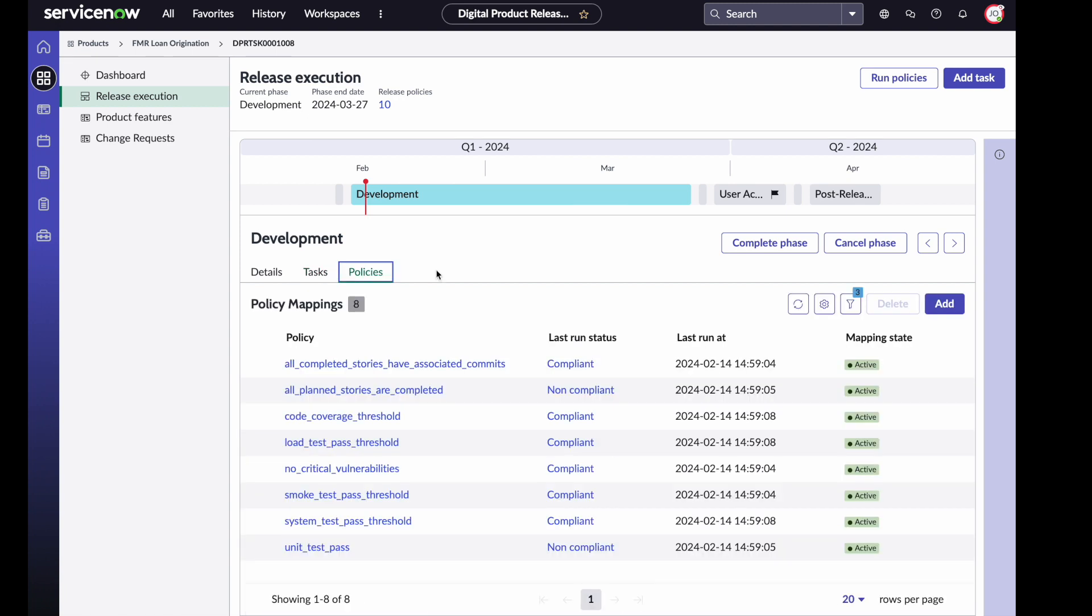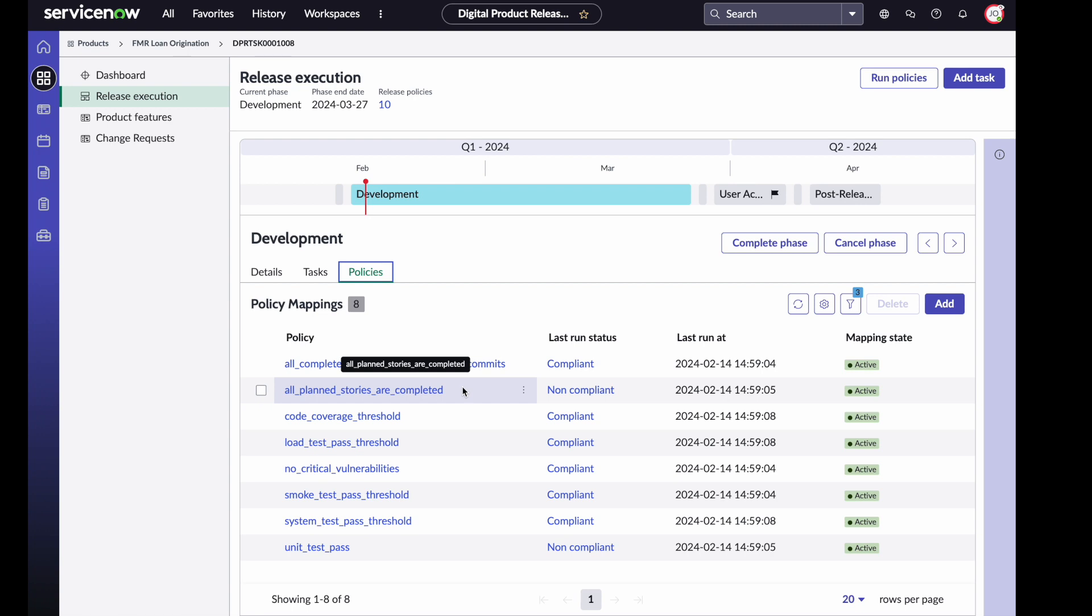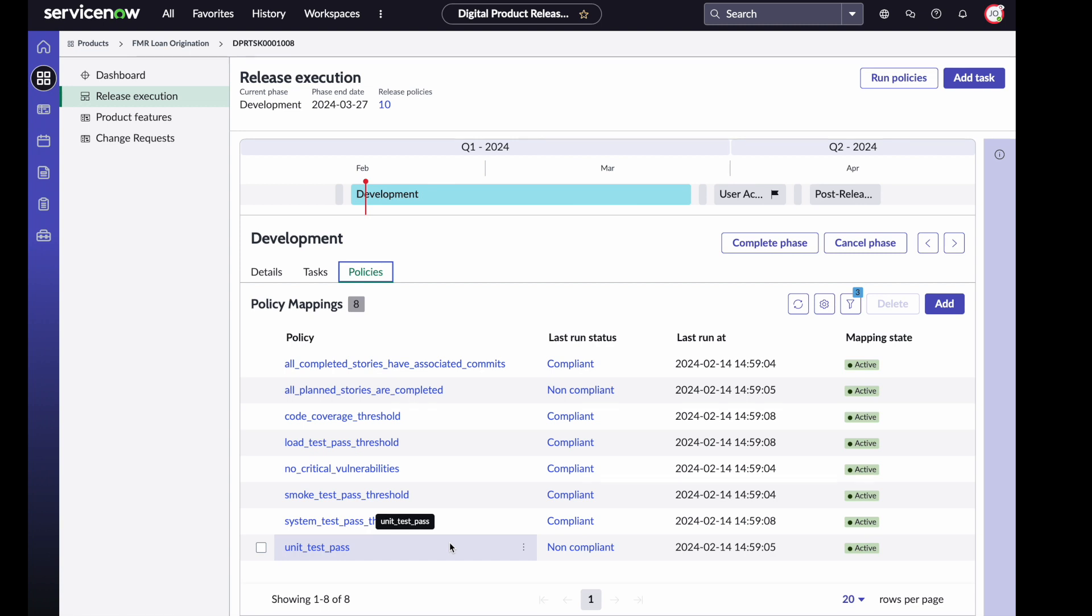Finally, we have our last tab, which are the policies. Policies are at the heart of validating that this release is ready. The development phase has eight policies, most of which are compliant, but we do have some non-compliant ones. Our non-compliant stories right now is that all of our stories must be completed. That's a policy that many customers that I've worked with have had, and also the unit tests are passing. Currently, there are some failing unit tests that I maybe need to drill into. These are our set of policies to say that we are finished with the development phase and can move on to our next phase, which is packaging, before we get into user acceptance.